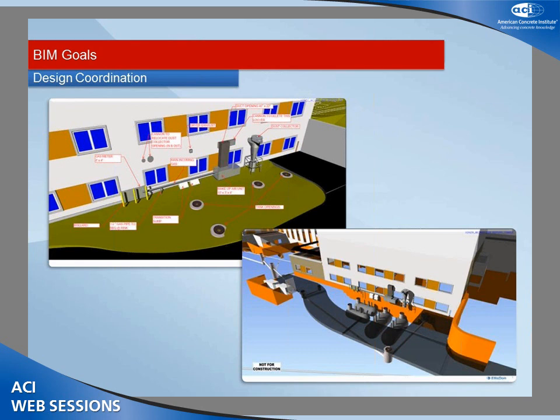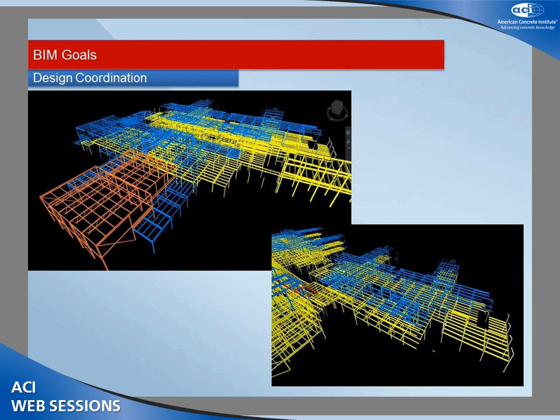Here's a quick example of some design coordination. You get complexity managing many different systems around the same zone. This is a precast building — those are precast panels on the exterior. We had to have all the holes cut for the various systems in the exact correct location when the panels came to the job site. Using the 3D systems, you can actually visualize how these things are going to come together and make sure they're going to fit.